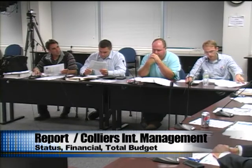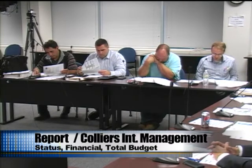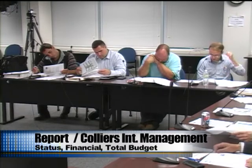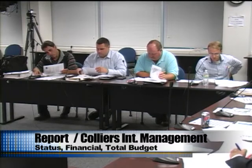That being said, we haven't heard of any issues with the quality of Shawmut's work, and we've been on site as well and think that things are generally the way that the project was bought out. In terms of the budget summary, if you include the soft cost and the construction contract, we are 51% paid to date, obviously leaving somewhere in the range of 48 to 49% unpaid, which is right in line with what we have paid Shawmut and with where we are in the schedule in terms of percent complete with construction activities. So we feel like we're in great shape there.